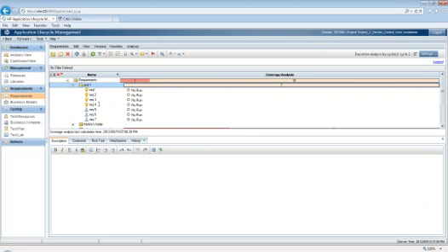So all the development type that you've typed in your requirements will then go back into the requirement, which will then go back into PPM. So yes, definitely yes. This is why we're actually doing it, because we want the project manager to have access to some sort of information detailing all the number of hours required for development and for testing. Quality Center gives you that. But if you use PPM in your organization, then definitely yes, this is the route to go. Capture everything in Quality Center.